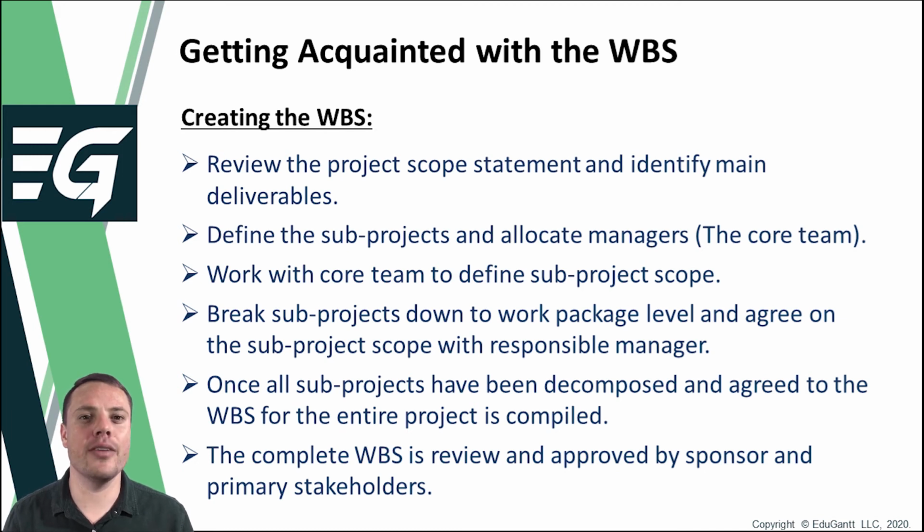What is, however, sometimes included in the WBS is the agreed high-level time and cost constraints, as these factors may exert significant influence on the scope development of the sub-project. Information such as the time and cost constraints are typically included in the initial work breakdown structure dictionary and later elaborated on. We will revisit the WBS dictionary in just a second.